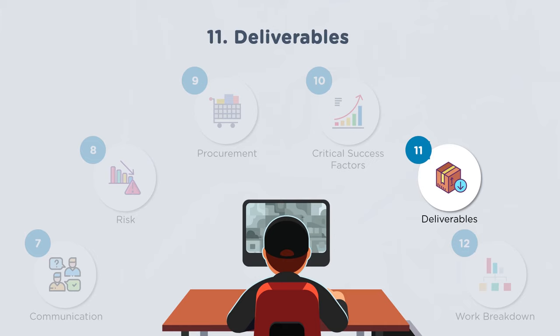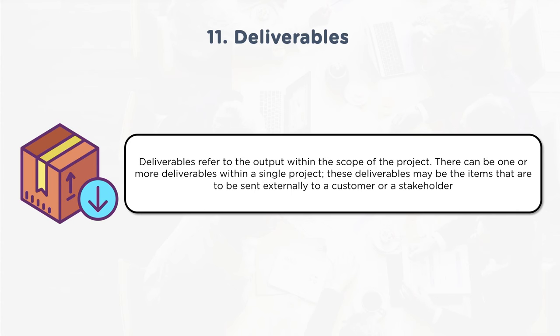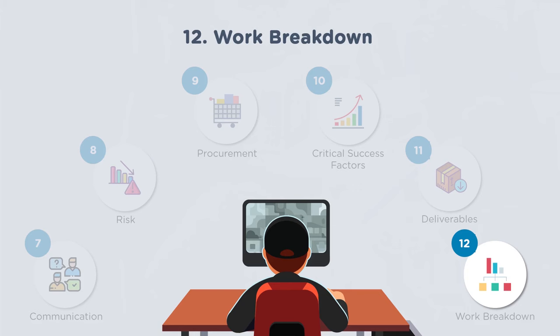Deliverables are the outputs of the project — a product, service, or result within the project's scope. There can be one or more deliverables in a single project, some sent externally to customers or stakeholders. Each deliverable has a defined scope and specification, must be measured and tested, and formally accepted. If there is a deviation, it goes back for correction through quality control processes.